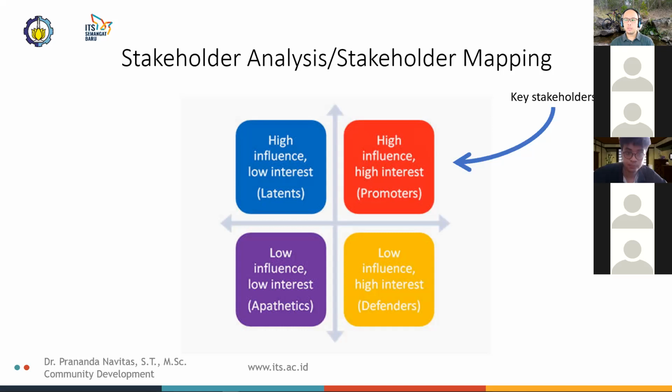An assumption that most proponents of this analysis technique seem to make is that the stakeholders most important to the success of your effort are in the upper right section of the grid, and those least important are in the lower left. So that's a general assumption that most people who use this technique adhere to.